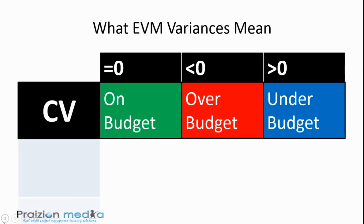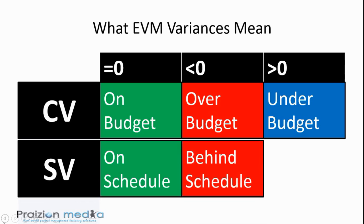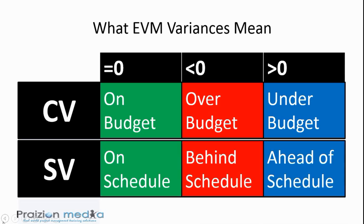Looking at the schedule variance, if your schedule variance is equal to $0, it means you are on schedule. Less than $0, you are behind schedule. And greater than $0, it means you are ahead of schedule.